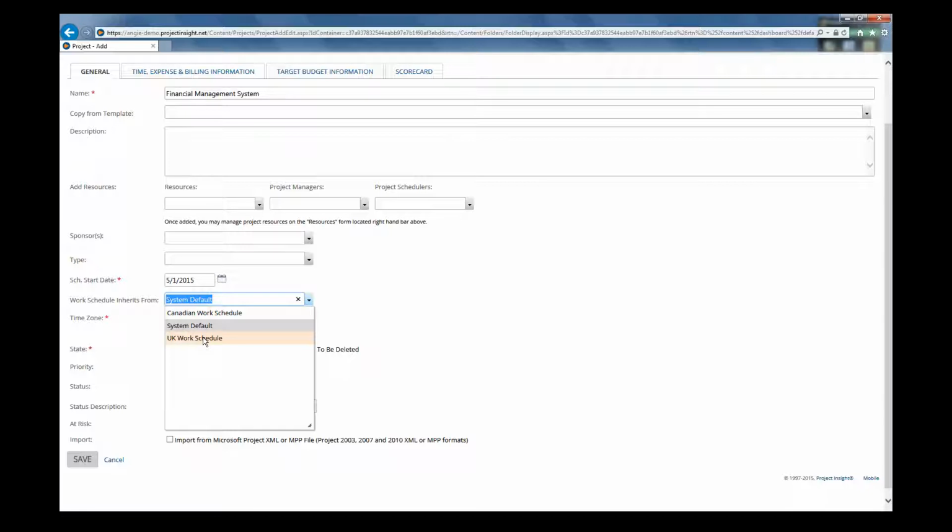Typically, a work calendar will identify the holidays and standard work days for different regions or different countries. However, it's also been used to do things like schedule staff that are maybe doing field work and they only work 4 days a week, but they work a 12-hour day. Maybe you would set up a calendar to represent their work schedule versus people in the office, which is a 5-day work day at 8 hours a day. So it's used for different purposes, but the main one is usually for regions or countries.